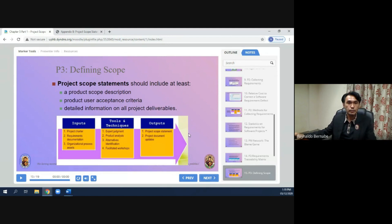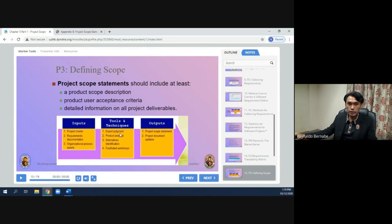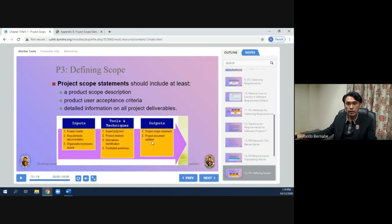Next is defining scope. Project scope statements should include at least a product scope description, product user acceptance criteria, and detailed information on all project deliverables. The inputs are the project charter, requirements documentation, and organizational process assets. Tools and techniques are expert judgment, product analysis, alternatives identification, and facilitated workshops. The outputs are the project scope statement and project document updates.